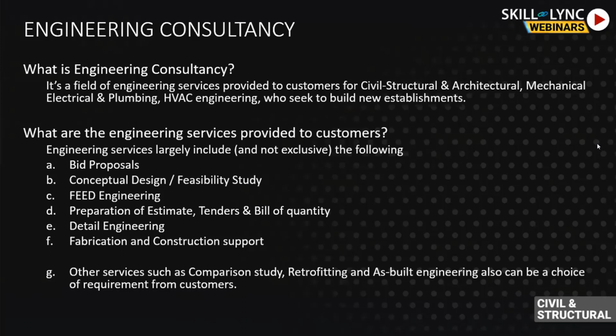Once it reaches the fabrication shop, further shop drawings, fabrication drawings for each member of steel get developed, and it goes into fabrication. Otherwise, in construction support, when the IFC drawings, the final deliverable drawings, go to our site, the excavation work starts, the foundation starts, and so forth.